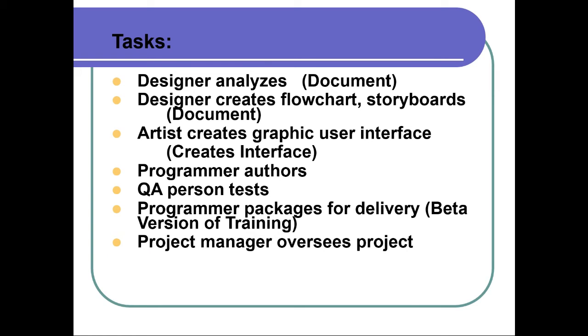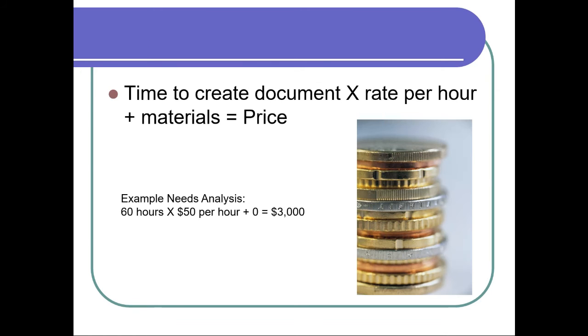And then of course, I want the project manager to oversee the entire project. Sometimes that's buried in the overall rate, but more and more I'm seeing that as a separate line item of how many hours the project manager is going to spend overseeing the project, which is good.